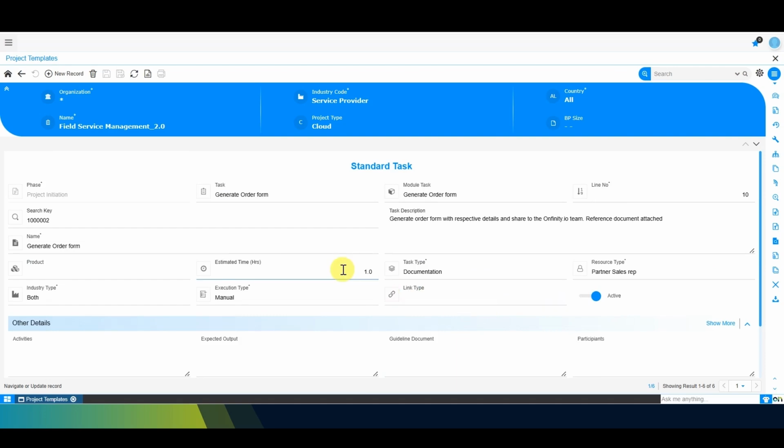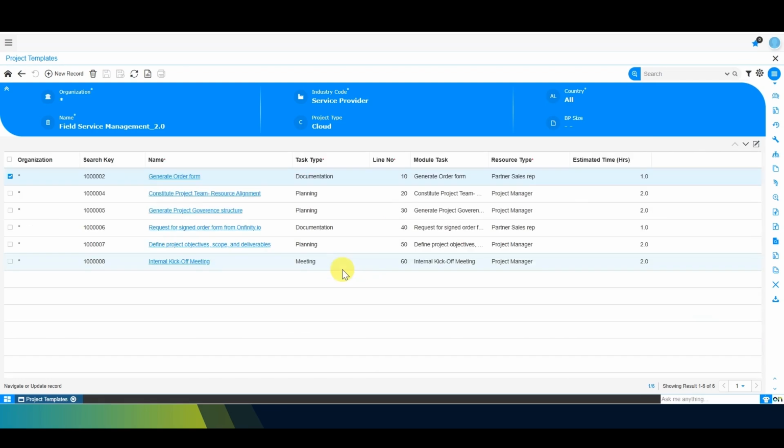Also, for the project estimation that you have to provide to the client, or maybe you need it for the evaluation of the project, you can do it with these estimation hours also. All the tasks that need to be performed are already available. You have to provide the right time according to your team on each task. Afterwards, you can see the consolidated time, the consolidated man-hours being taken in that project, and you can quote to the client accordingly. This is one project, one task.